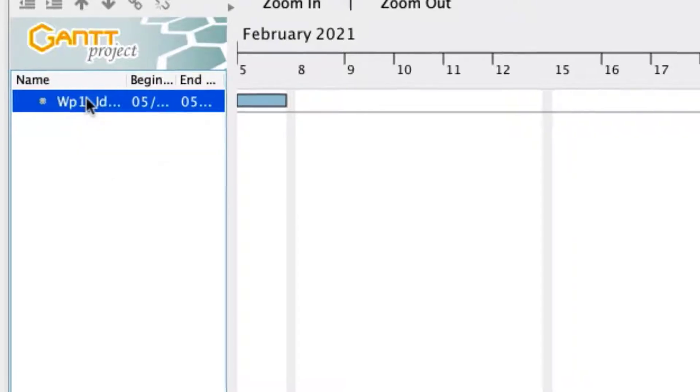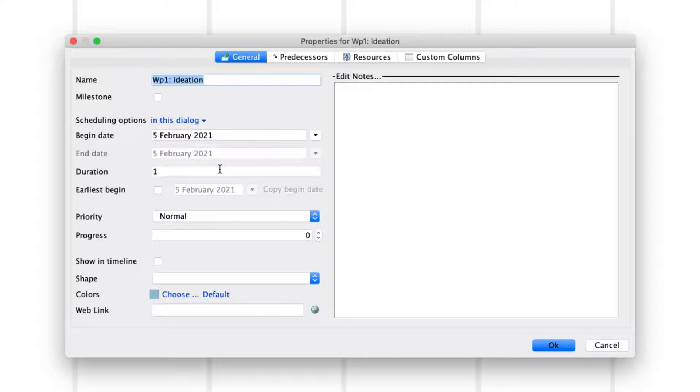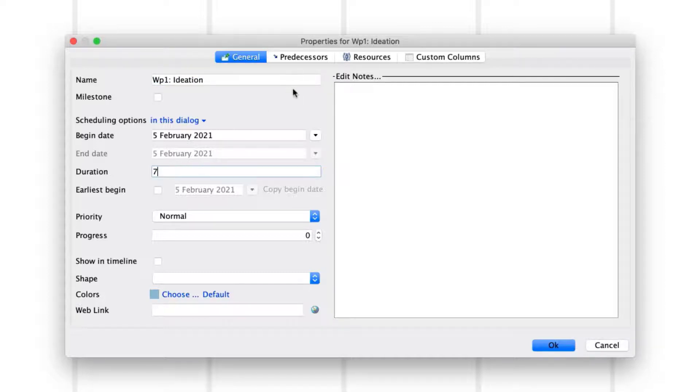To add more details, double-click the activity to open its property menu. In the General tab of the Properties menu, add the desired start date, in this case today, and the number of working days you planned for the activity to last, in our case 7 working days.